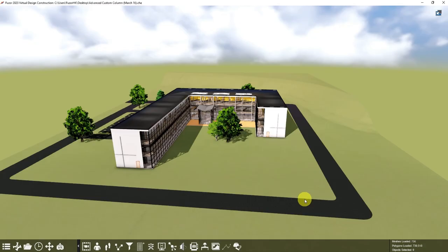In this video, you will learn about the 5D cost graph. Fuser allows you to calculate costs with resources, import costs from other software, or edit costs manually. Costs can be used to create graphs or be exported to a spreadsheet with schedule and BIM information to use in other software. Costs appear in the 5D simulation columns and are associated with a particular set of dates that is loaded into either the primary or secondary simulation columns. By default, the costs displayed in the schedule are the budgeted and actual costs of the project schedule.